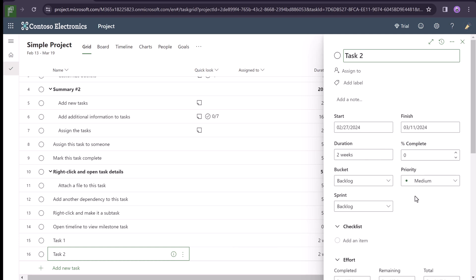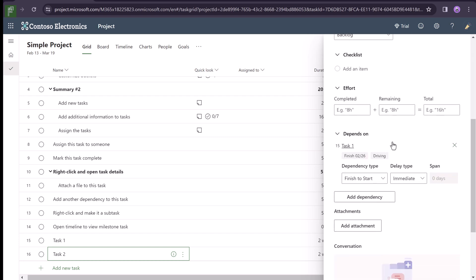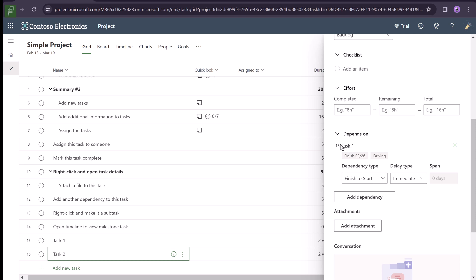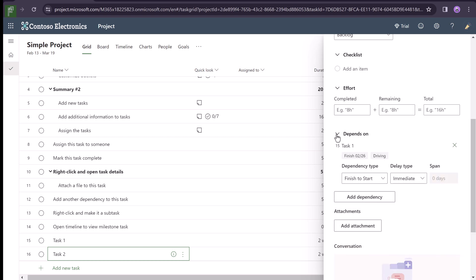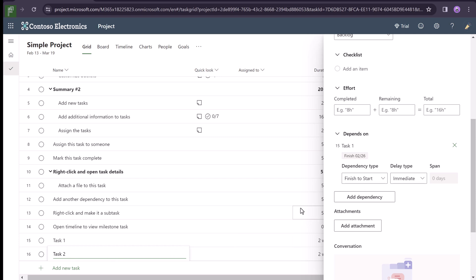If I click on this button I get more information about that task. I can add labels, assigned to, set priority, add a bucket. Here we see that I have a depends on, and we have the option to open that up and create a drop-down. If I look at the current scenario here it tells me more about that dependency. If I click on start-to-start, it changes — it's no longer a driver for that task. So let's have a finish-to-start dependency on 15.